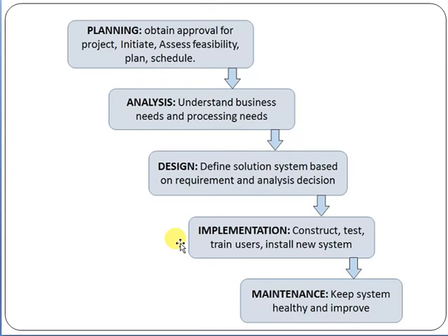Here remember, friend, one thing: the development team basically needs a functional specification document and the architecture document. They need the functional specification document because they actually need the technical specification for the implementation of a project. It will also involve the installation of the system and training the users. All those things come under the implementation phase. Once the implementation phase is complete, the operational or maintenance phase will start. In that phase the operational team will get involved. Once the implementation is complete, the operation team provides support, production support, to the customer, and the implementation team withdraws from there.